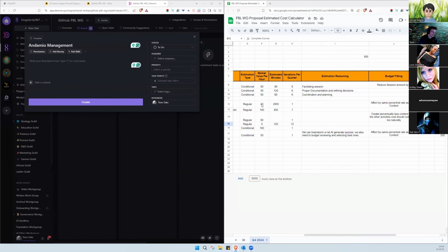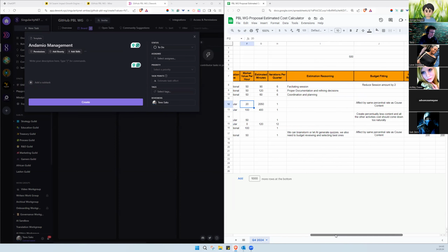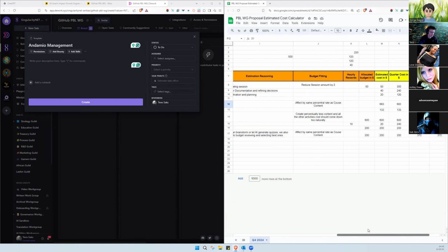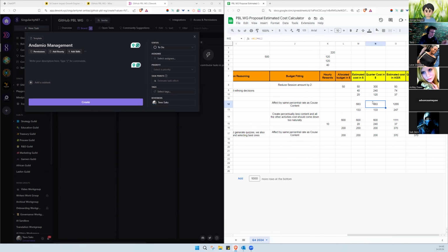Even though we say it's $20 per hour, it's no longer actually effective, in the sense that this is our maximum reward. So every month we will divide this. We can't use the estimated cost, so we divide it by 3 and then reduce it by 20%. And this is the first month bucket.